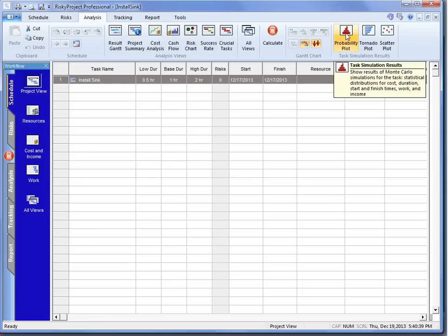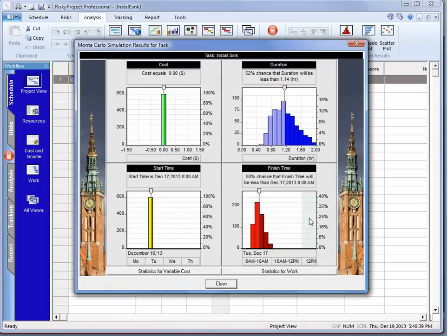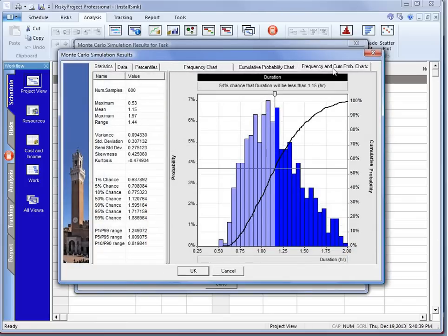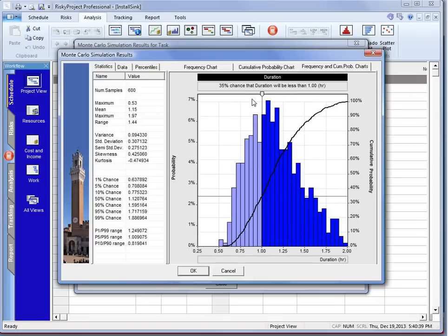And one of the things that we'll see is we can go and find the probability. And these are the charts that we get out of this. This is the key one, especially when we're looking at duration rather than finish times. What we can see is that if my original estimate, let's say it was an hour, was the most likely, I can see I only have a 35% chance. Because of the nature of the triangular distribution, we can see I only have a 35% chance if I met that.